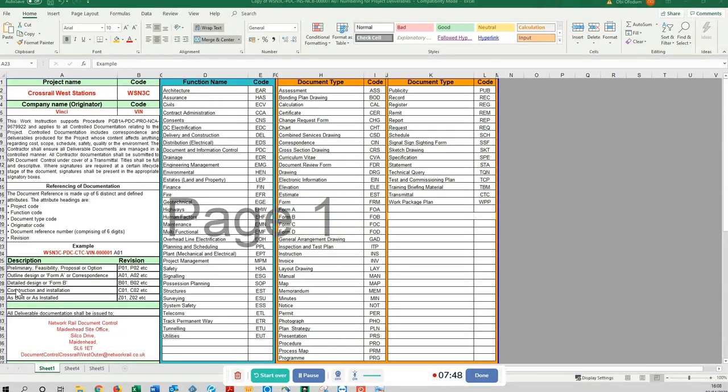Once we went into construction and installation, all documents or drawings related to construction and installation were given C01 and C02, etc., increasing from there. And once we had finished the project, every document that would represent the as-builts, and we have a different module for as-built so you can understand what as-built documents are, like O&M manuals, all documents under the as-built were labeled Z01 or Z02.